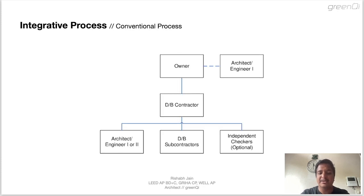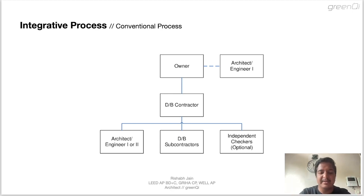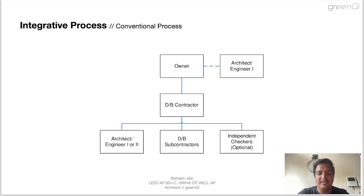Let's say a client wants to build a commercial tower. He will first hire an architect and ask him to make a design. The architect will come up with a design in consultation with the client and prepare good-for-construction drawings and cost estimate. The client will invite bids for construction based on the cost estimate and construction drawings provided by the architect, and choose an appropriate contractor to carry out the work. The contractor then appoints subcontractors such as electrical, plumbing, HVAC and other things to carry out the work.